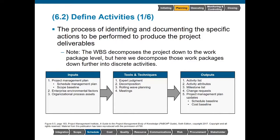Here, we're going to take those work packages and actually decompose them further to get the discrete activities. So if we were looking at mashed potatoes, now we're looking at peeling the potatoes, boiling potatoes, mashing potatoes, adding butter, stirring, and so on.